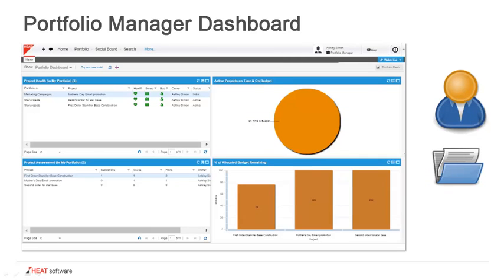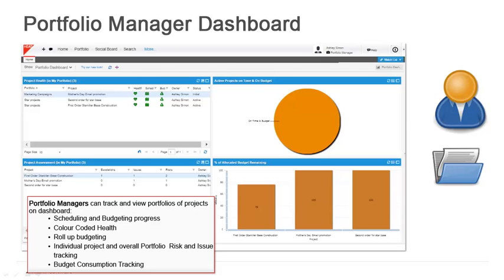The portfolio manager tracks a group of projects which are bundled into a portfolio. A portfolio is like a summary view of a bunch of projects. A portfolio manager can have multiple portfolios which in turn contain multiple projects. This would be more like a program manager who oversees a number of different projects that are going on, and they need a way of having a summarized view of those. If they can organize them into portfolios, they can use the portfolio from a budgetary perspective and have it all roll up into one master budget.